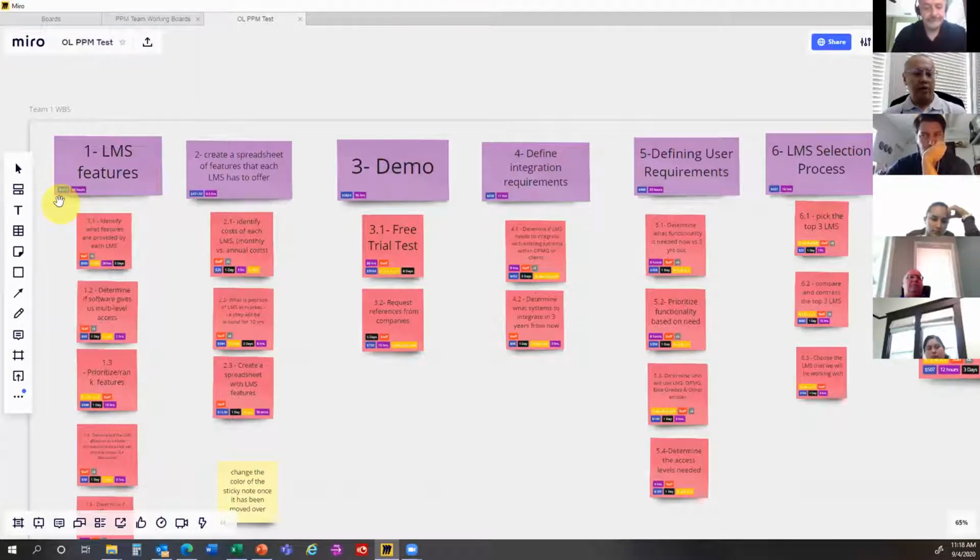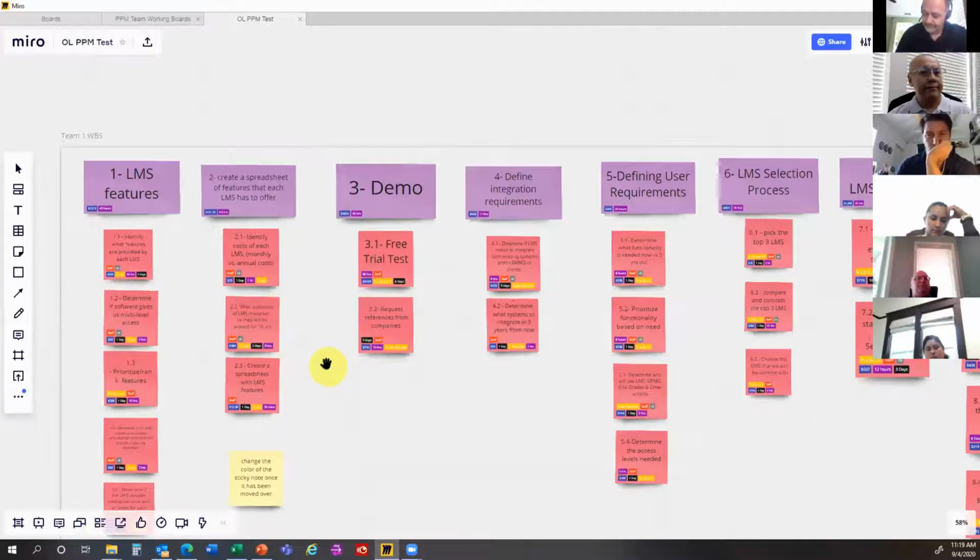So when we start taking this horizontally to create a schedule, I can start looking at my burn rate on this project, on that timetable, both from an hours perspective and a dollar perspective. Two key performance indicators you need to look at: burn rate on your hours, burn rate on your dollars, in addition to the percent complete of duration. Questions?